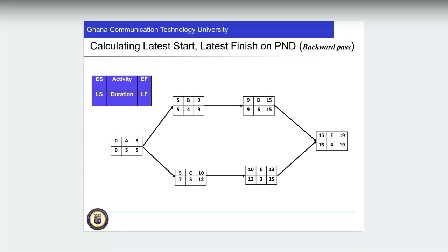Latest start becomes the latest finish for the previous activity. So you can see the latest start for the successor is always the latest finish. Even though there's no formula for this, that is how I want to simplify it. I just looked through and realized that is what was done. So the latest start of the predecessor, since we are moving back.